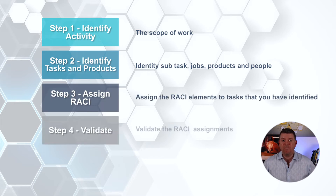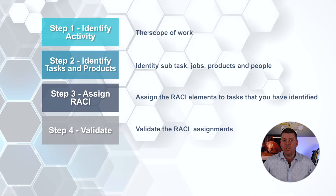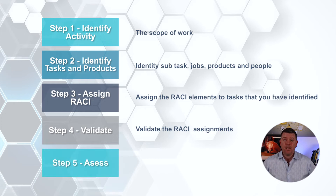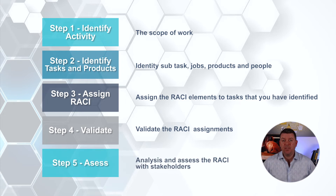In step 4, validate that all sections of the RACI are completed and ensure that every task has at least one stakeholder responsible for it. Remember, no task should have more than one stakeholder accountable. Lastly, share, discuss and assess the completed RACI with stakeholders to resolve any conflicts or ambiguities.